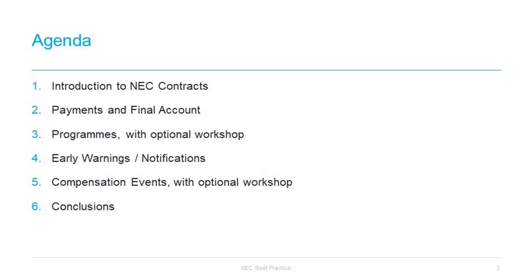is the purpose here. In more traditional contracts, it is easier to bump issues to the end, make claims, and perhaps get a financially acceptable result later on. With NEC, it is trickier to do that, and easier for a contractor to find themselves inadequately compensated for what they've done on the contract. That is simply the way that NEC's contracts are set up, and as a result of how it is supposed to operate.